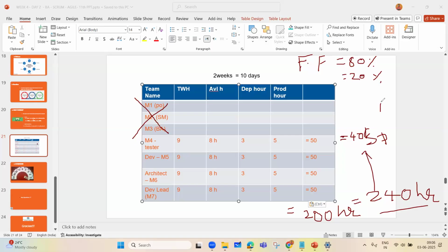Considering this point, because story pointing may vary in a real-time scenario and everyone can give a different estimation, here you are seeing 40 story points. It may happen tomorrow that you find the capacity is more and velocity is less, or story pointing is less and the team is ready to commit to 50 story points instead of 40. Possible? Yes or no? Yes.